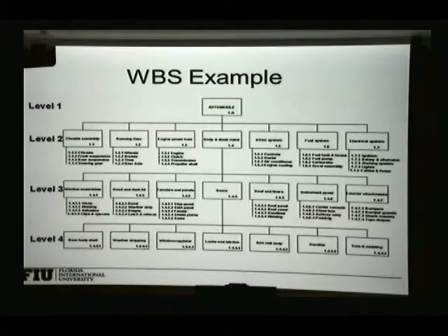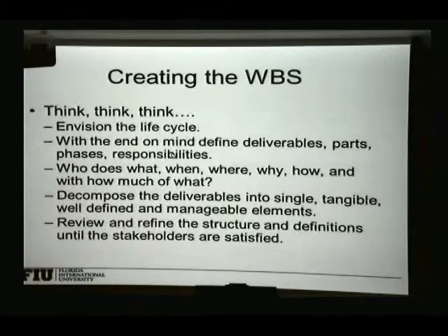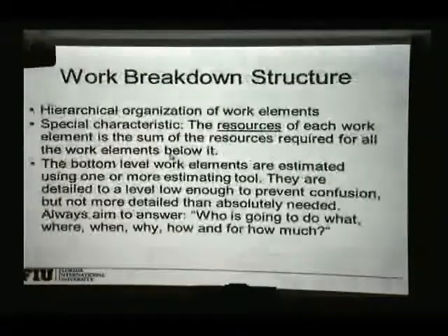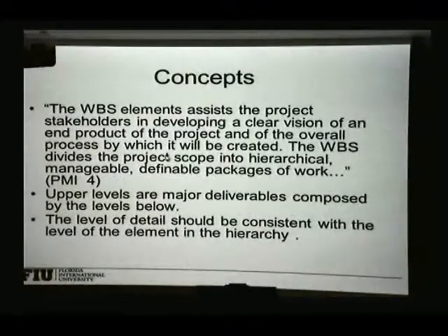We do the same with the cost estimates for our construction project. Basically, what we want to do is break it down following the CSI format. So we take the CSI divisions, we break our project into those 50 divisions, and we start working out how much each one of those costs.